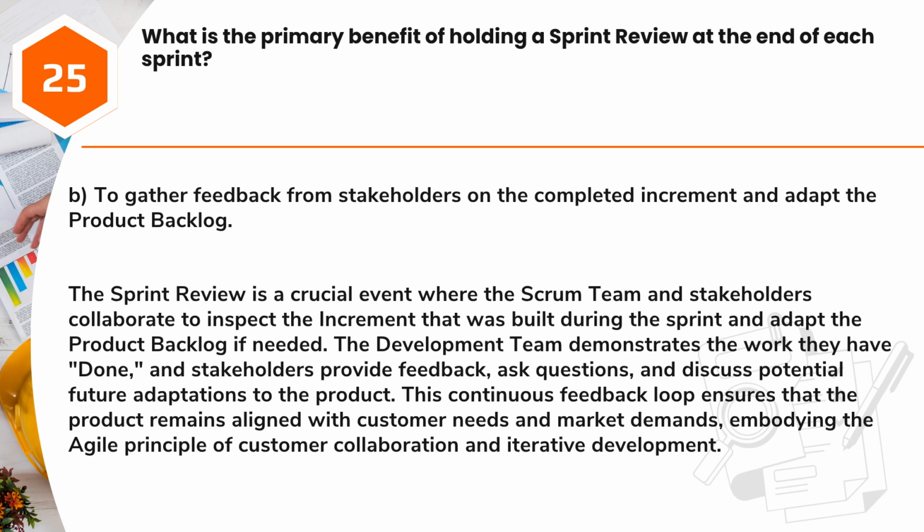Answer: B. To gather feedback from stakeholders on the completed increment and adapt the product backlog. The sprint review is a crucial event where the Scrum team and stakeholders collaborate to inspect the increment that was built during the sprint and adapt the product backlog if needed. The development team demonstrates the work they have done, and stakeholders provide feedback, ask questions, and discuss potential future adaptations to the product. This continuous feedback loop ensures that the product remains aligned with customer needs and market demands, embodying the Agile principle of customer collaboration and iterative development.